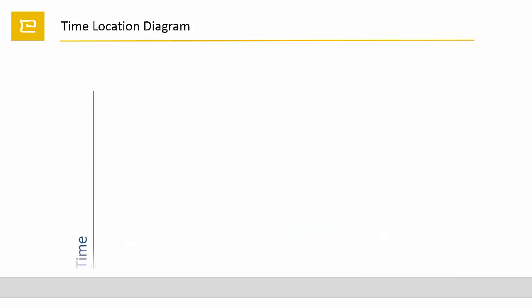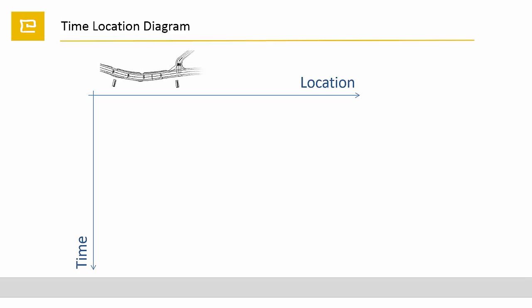So let's add to the time axis in Gantt diagram a right angled distance axis. Very common is to display the time axis vertical and the location axis horizontal. The site map is added alongside a distance axis to check the location of an activity. This little animation is to be explaining the idea of planning in a time-location diagram.